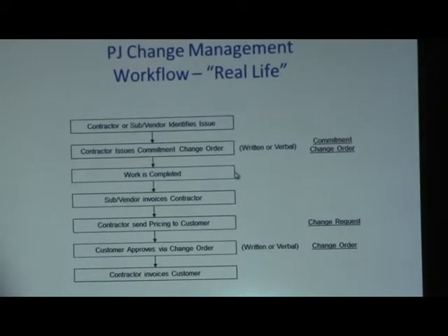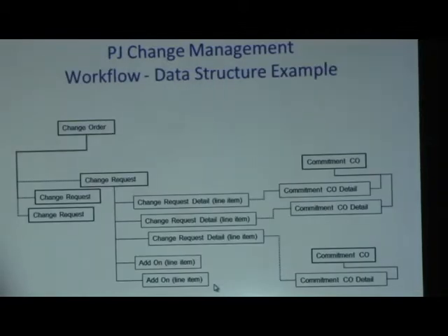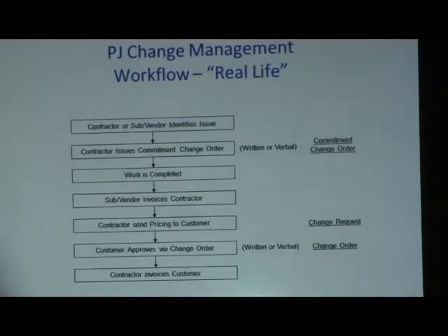What often happens is something comes up, you tell your subs to go take care of it, they go do the work, you find out what it costs when you get their invoice, you then package that all together and send it to your customer as, here's a change order request, and you cross your fingers that the customer approves it so that you can bill the customer. We'll have field copies signed.